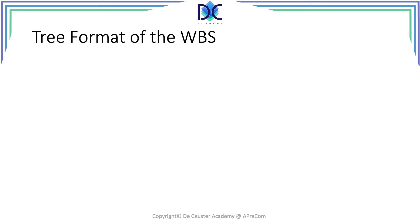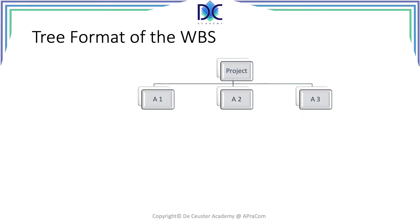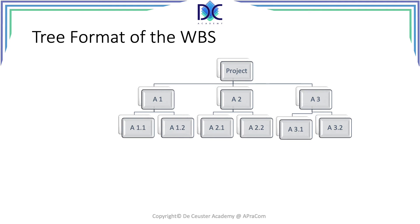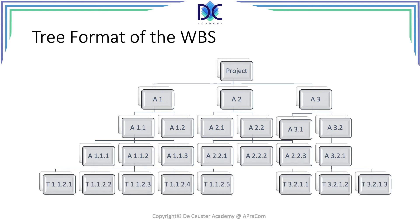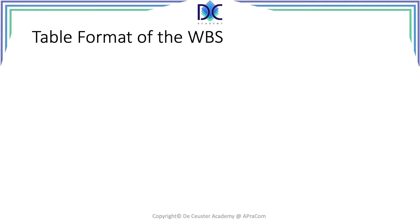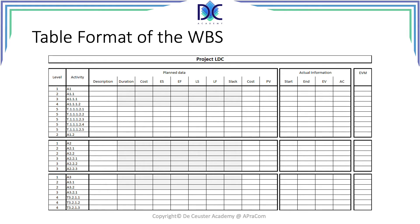When we look at the different formats of the WBS, the first format is the tree format. At the top level, or level zero, we have the project. We decompose into lower levels with more detail and more items, until we reach the lowest level — the work packages. Another format is the table format, like a spreadsheet, where we have all activities with more information, and it is typically linked to the Gantt chart in software.